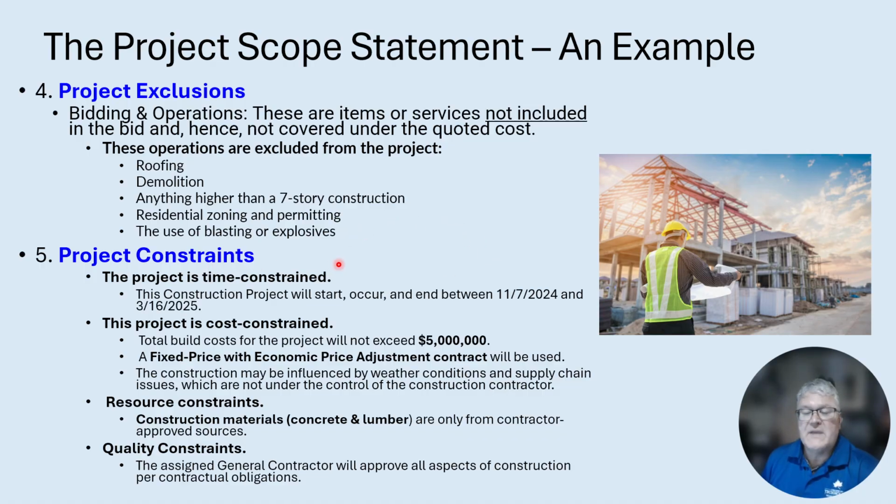The project will be constrained by time. The construction project will start and occur between 11/7/2024 and 3/16/2025. The project is constrained by cost. The project will cost no more than $5,000, yet a fixed price and economic price adjustment contract will be used.